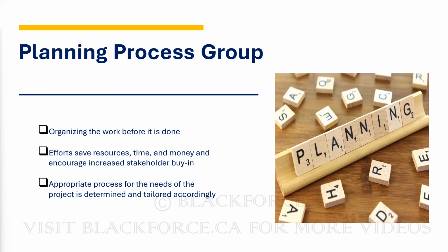After you've done this, get people in, you have to conduct interviews, you have to analyze those interviews, then you have to tell them that they've passed the interview. So you sequence those activities. When you now sequence the activities, you start putting budget to each of those items.